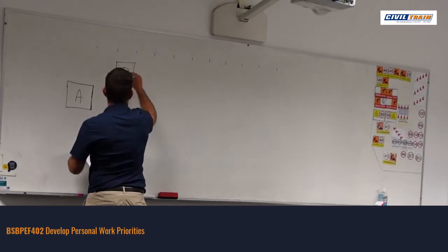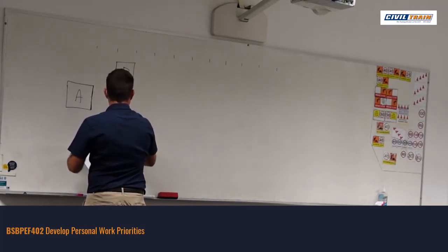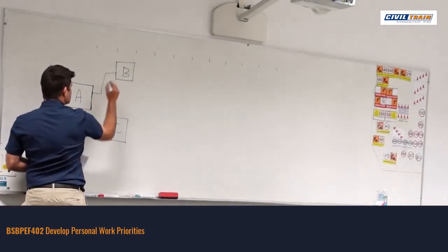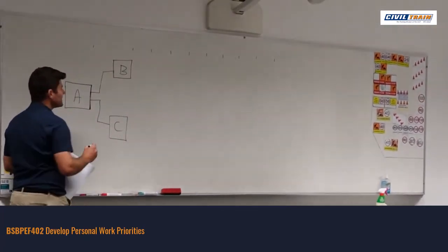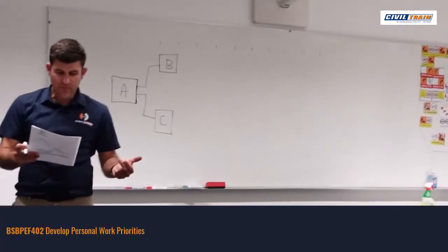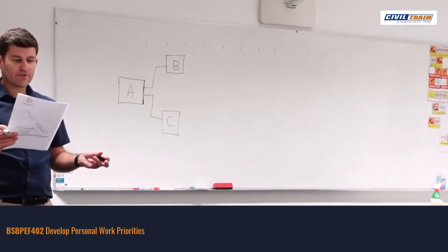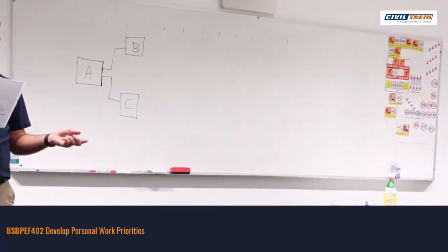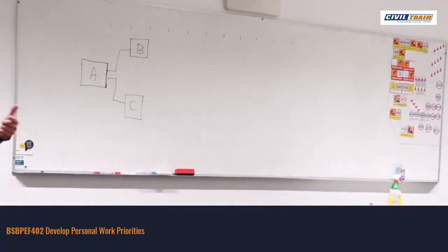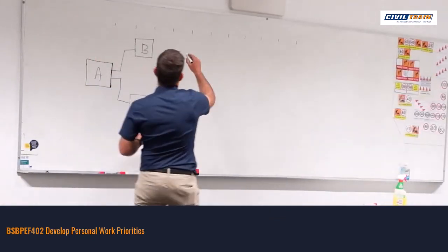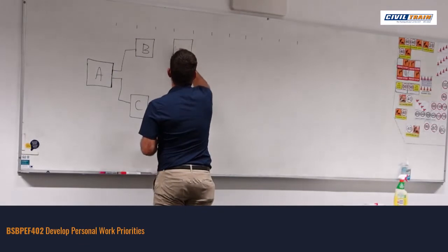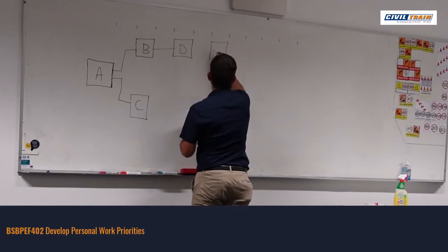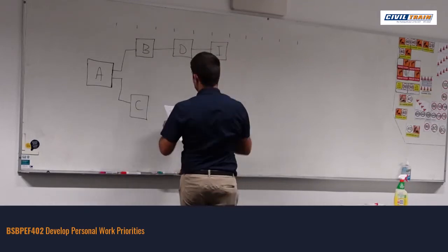I want to put B and C. So I've got B and C follow A. And what I'm doing is I'm drawing in dependency lines. I'm just working my way through. Then I've looked at information, and I've got D precedes I but follows B. So D's before I, but then follows B. So I'll put in the follows B must be here, but precedes I. So it's before I, so I comes in there. I was using that information.